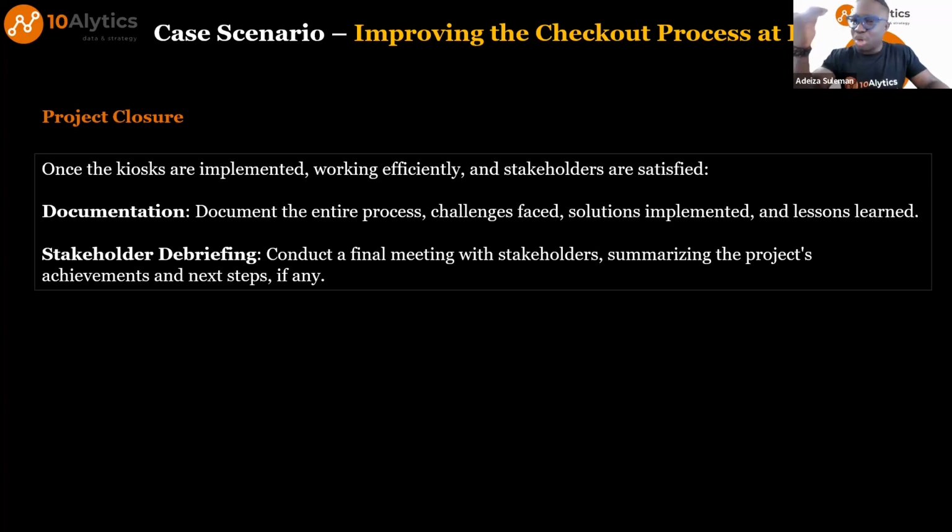All right. So you document the entire process, all the challenges you faced, the solutions you've implemented, your lessons learned, most importantly, for future purposes. If you are deploying similar systems, you can always learn from the previous projects you've deployed. All right. You'd also present to your stakeholders, carry out a project debriefing to the different stakeholders, summarizing your achievements, the next steps, and so on and so forth.